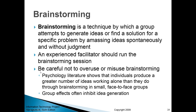Brainstorming seems like a natural, intuitive, and easy technique to start with, but you need to be aware of its limitations so that it is not misused. For example, it's a well-known fact in psychology research that individuals produce a greater number of ideas — or at least some individuals produce better ideas — while working alone than through brainstorming in a small face-to-face group. The reason is that group effects often inhibit idea generation. Sometimes individuals are too shy to share their ideas, and sometimes they're reluctant to propose an idea that is contradictory to what the group seems to converge on.